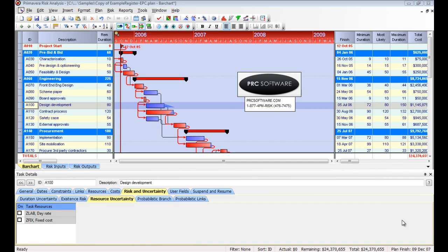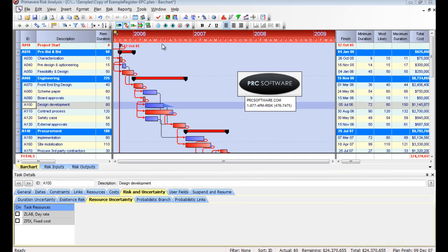So we've loaded uncertainty on our project. Now maybe not all projects, based on where you're at, bid level or what have you, have a full risk register. However, if you do have a risk register, that's what we're going to look at now: our risk events or items external to the schedule that really should be linked in because they may have an impact on the schedule. So when you think about risk events, they're basically activities that may or may not occur. So from a scheduling point of view, if you start to think, if a risk occurs, where would it affect the logic network? That's kind of where we're going to go.